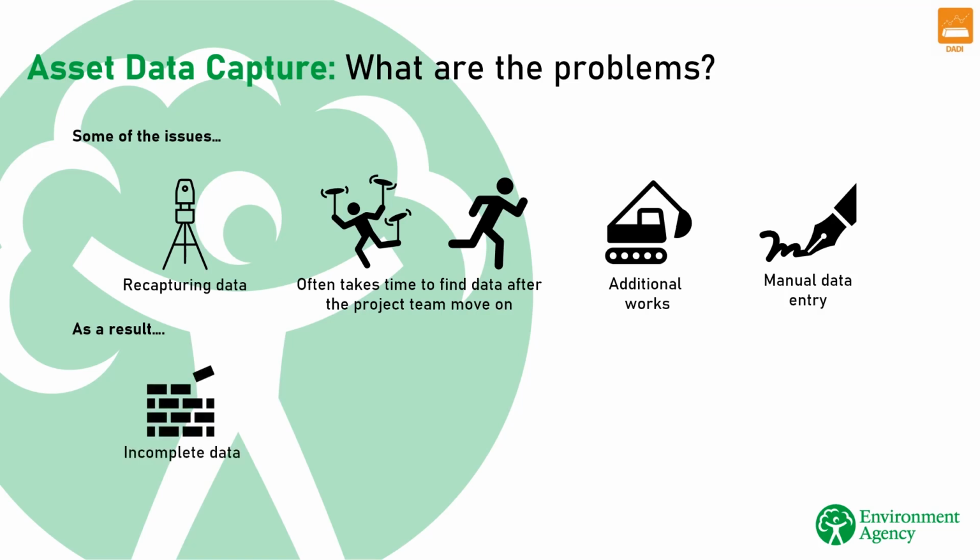In many cases, over 40% of data collected on an asset during the project phase is missing in the operational phase. There is significant delay in information, often over 18 months after handover, because it has to be added manually to operational systems. This means that asset data can't always be trusted and fails to fully support operation and event management.